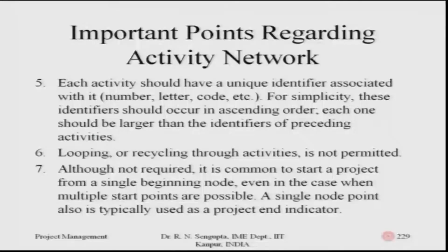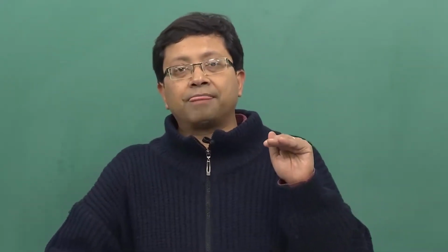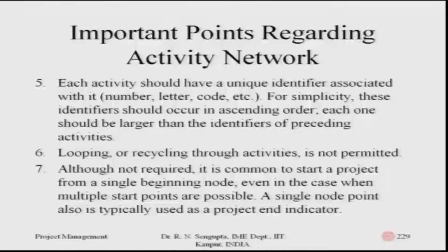Looping or recycling through activities is not permitted. Even though looping and cycling is not permitted, if you see this sixth point, remember that looping would be part of the consideration when we go into GERT and Q-GERT concepts. That was one of the main books based on which we will try to cover these concepts, by Pritsker. Although not required, it is common to start a project from a single beginning node, even in the case when multiple start points are possible.